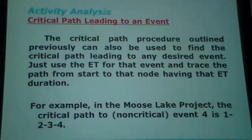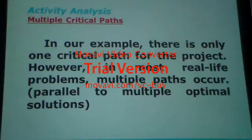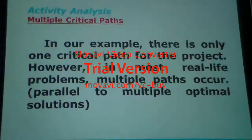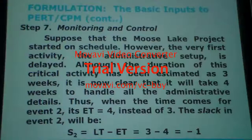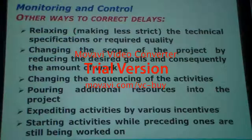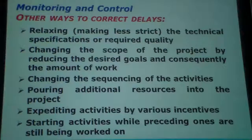Let's go to the critical path leading to an event that we solve in these two examples. In our example there is only one critical path for the project. However, in most real life problems, multiple paths may run parallel, giving multiple optimal solutions. In big projects there may be more than one critical path. How to calculate slack with these methods for each — let's come to PERT now. We'll finish with PERT, how to make the calculations.